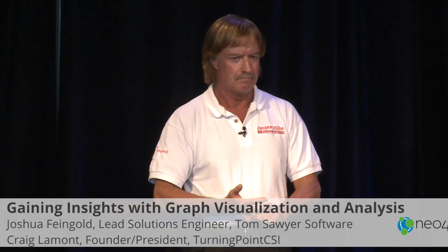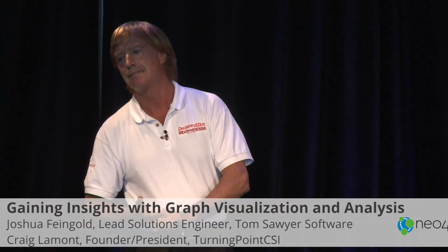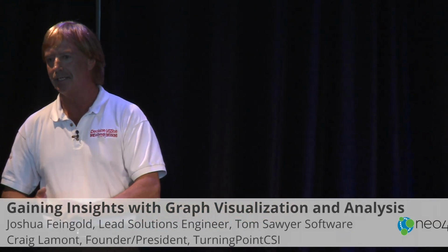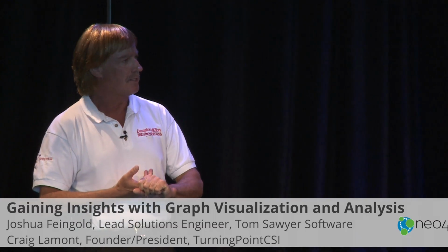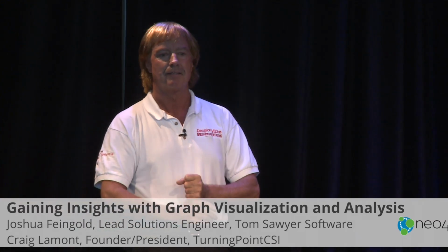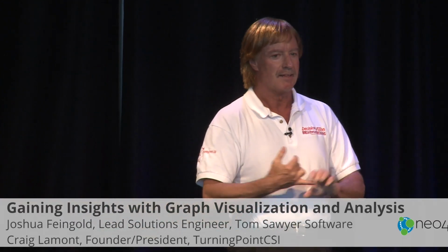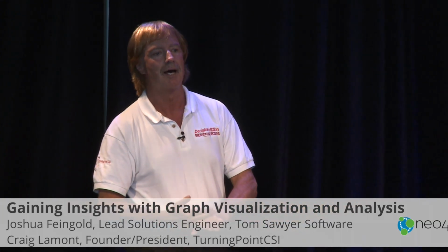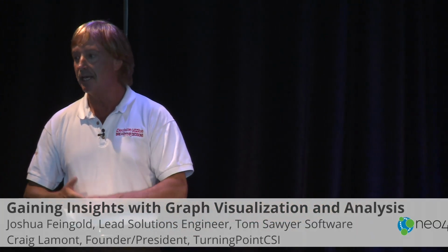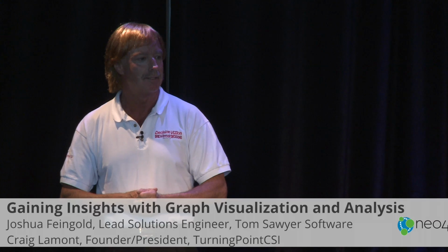If we go out for an RFP, that will take a month. We have to take 2 weeks to evaluate the RFP, and then another 2 weeks to evaluate it. Then another 2 weeks to negotiate a price. Then get the product in, train people on it, and get it to work. And then you can actually start implementing something.